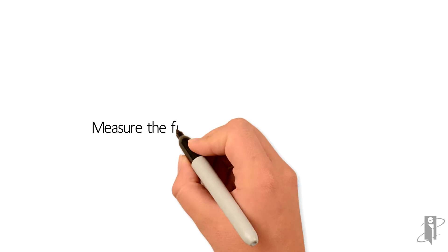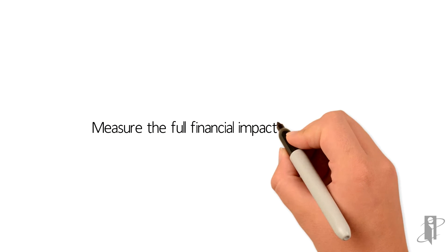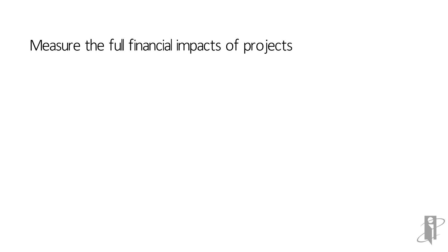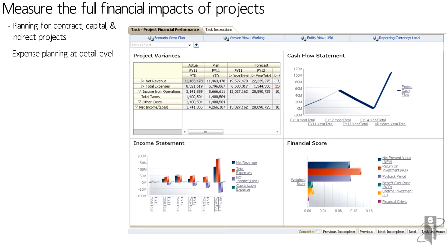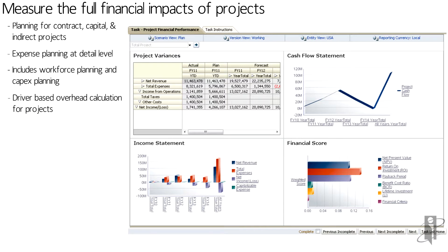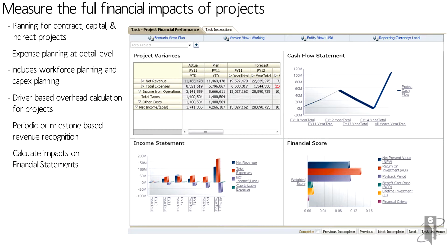PFP provides a number of out-of-the-box data forms, task lists, business rules, and components to meet the needs when you're planning your projects. You can plan for contract, capital, or indirect projects. You can do expense planning at a very granular level or at a summarized level. PFP includes workforce planning and capex planning modules, driver-based overhead calculations, and periodic or milestone-based revenue recognition. When you make changes in PFP to your forecasts, you can calculate the financial impact to your income statement, your balance sheet, and your cash flow.